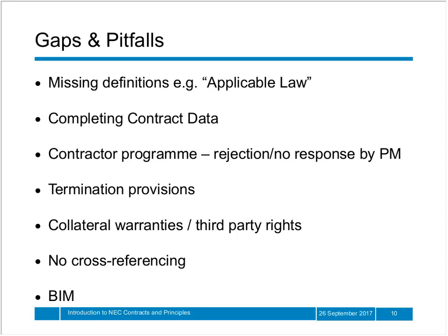In NEC 4, new provisions have been included which provide for a treated acceptance or deemed acceptance of the contractor's program by the project manager if he or she fails to respond to such a program. However, again, this does not cover what happens if the program is actually rejected.